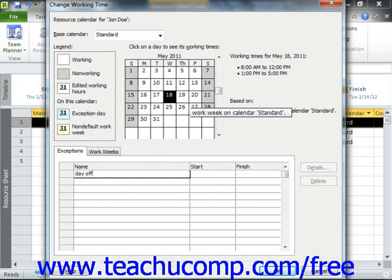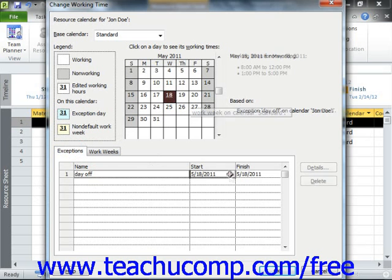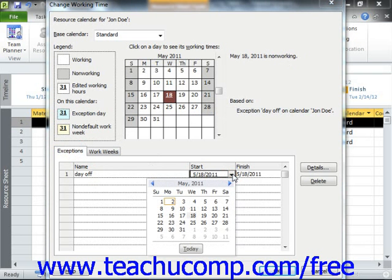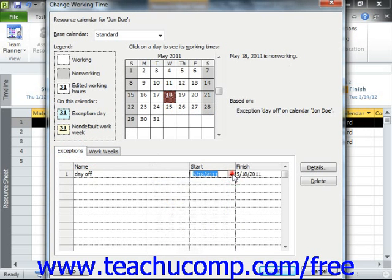When you leave this cell, the Start and Finish dates will default to the values selected in the calendar above. If this is incorrect, you can click into either or both the Start and Finish columns to indicate the correct start and end times for the time off from the project. You can then repeat this process as needed in order to enter any other time off for the selected work resource.